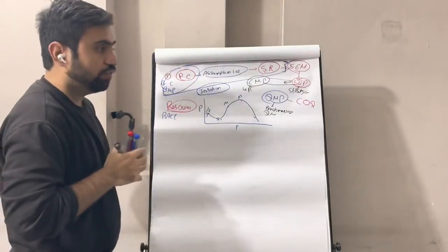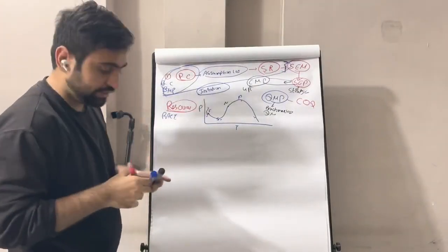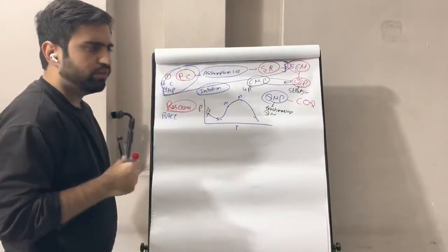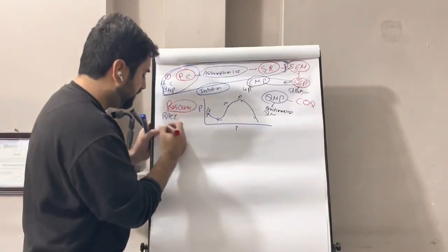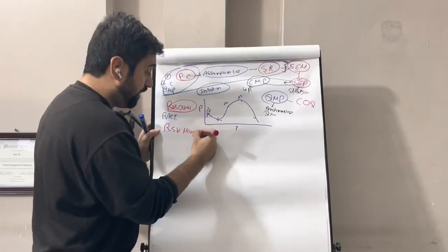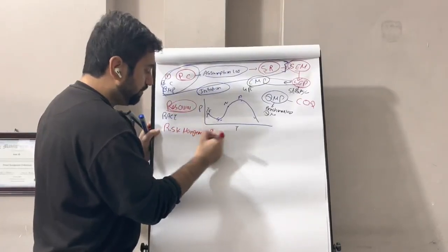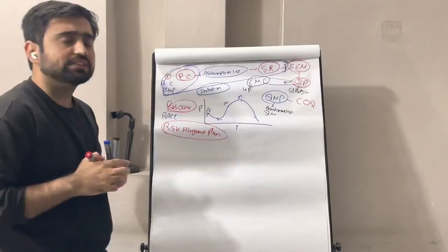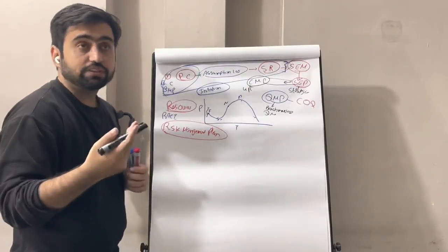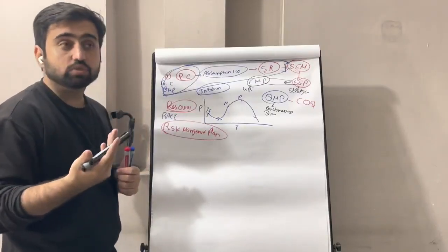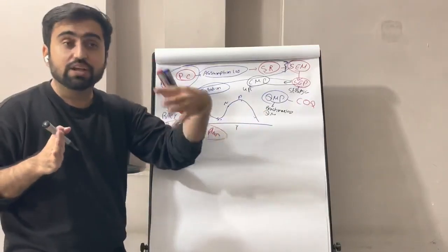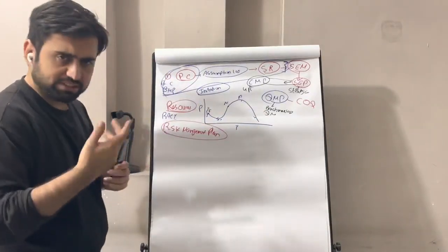Then we go towards risk. Of course, the risk plan and stakeholder plan are more iterative. We keep on doing that, but initially we make the risk management plan. Risk is very heavy in our planning phase. We make a risk management plan which defines the risk tolerance of the stakeholders, the roles, the metrics you are going to use for probability and impact, the threshold of the stakeholders, and past registers.